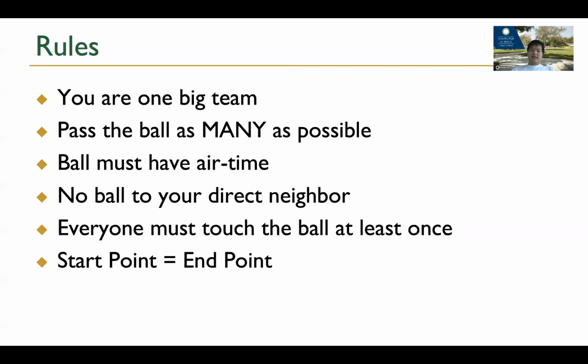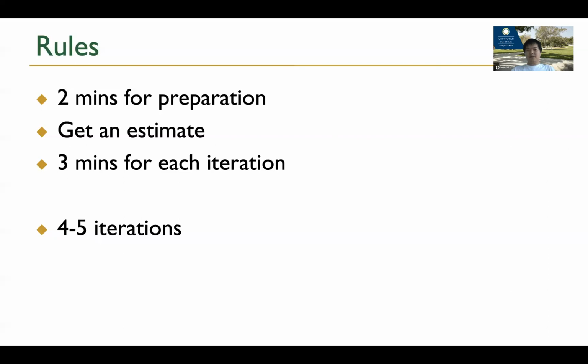Once I give the rules, I will ask everyone to get into a formation, line up, and start this game. Every time we give you 2 minutes for preparation, and then you need to tell us how many balls you think you can pass. Then we give you 3 minutes to actually try passing, and then we count how many you passed eventually, to see if there is a mismatch between the actual number you got and the goal you set. After that, you discuss and see how to improve, and then provide another goal and another iteration. So keep going, and we want to see if you can improve consistently, get more and more balls passed, and set the goals more and more accurately.